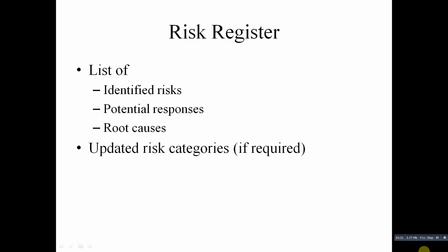check out these problems. Then the risk owner, or person who will take responsibility for the risk, should be included in the risk register. For example, a certain person might be in charge of any server related risk events and managing risk response strategies. Then that risk owner will be responsible to resolve all the problems related to the particular server.